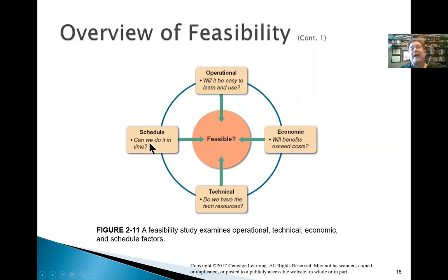Scheduling is, do we have enough time? And if we don't have enough time, then we got to think, what bits of the project do we maybe not do, right? This thing I just mentioned earlier, we got to push to the cloud for January 1st, 2020. There's some bits in particular, my operational reporting, I'm not going to be able to get done in time. We all know that. We're cutting that out of the scope of the project.